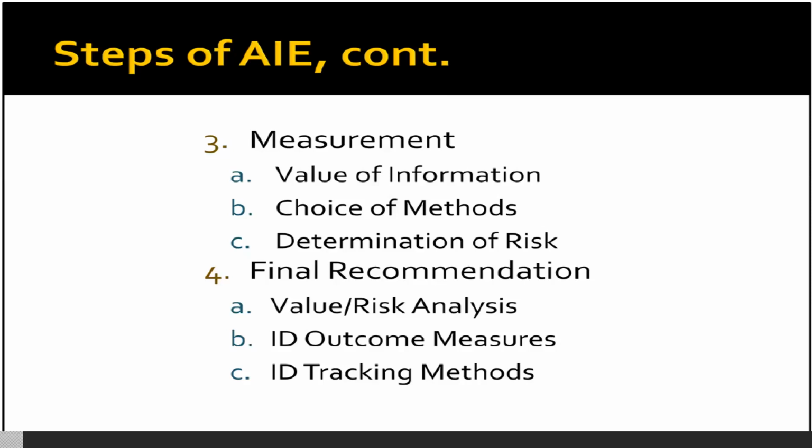You want to use your preliminary analysis to show the business needs, as well as to explain how the project will show value on multiple levels. You want to make sure that you've addressed the possible risks and identified what can be done to alleviate some of the uncertainty surrounding those risks. You will need to have identified both what outcome measures will be used to determine the project's success and how you will go about tracking those measures. It isn't enough to just identify outcome measures. You need to propose a method of tracking measures so that you can determine project impact and success. This will also provide a way to determine when your project is actually complete, rather than just continuing on indefinitely.